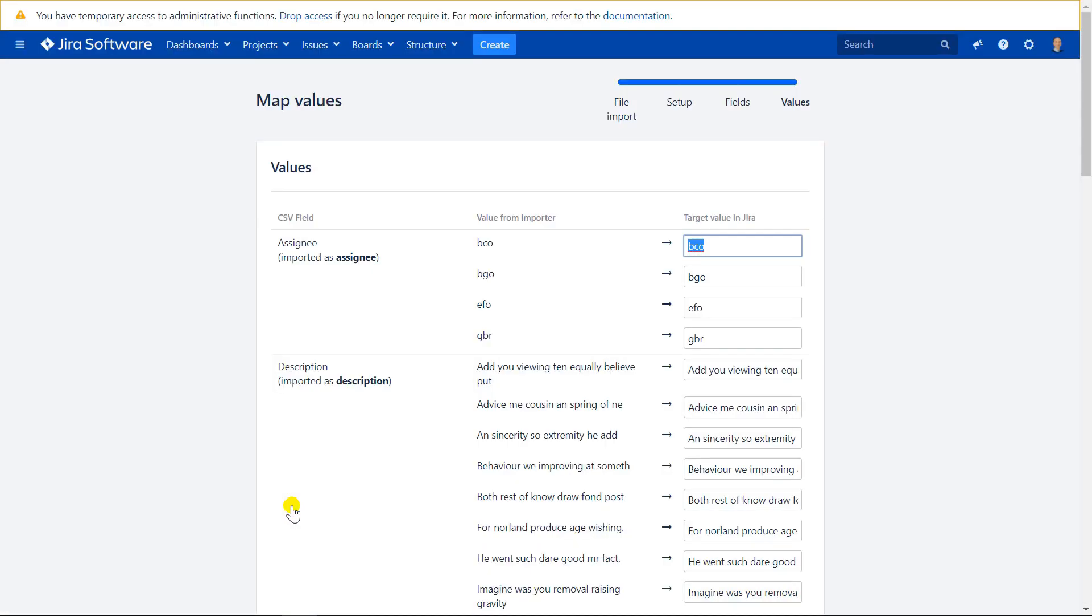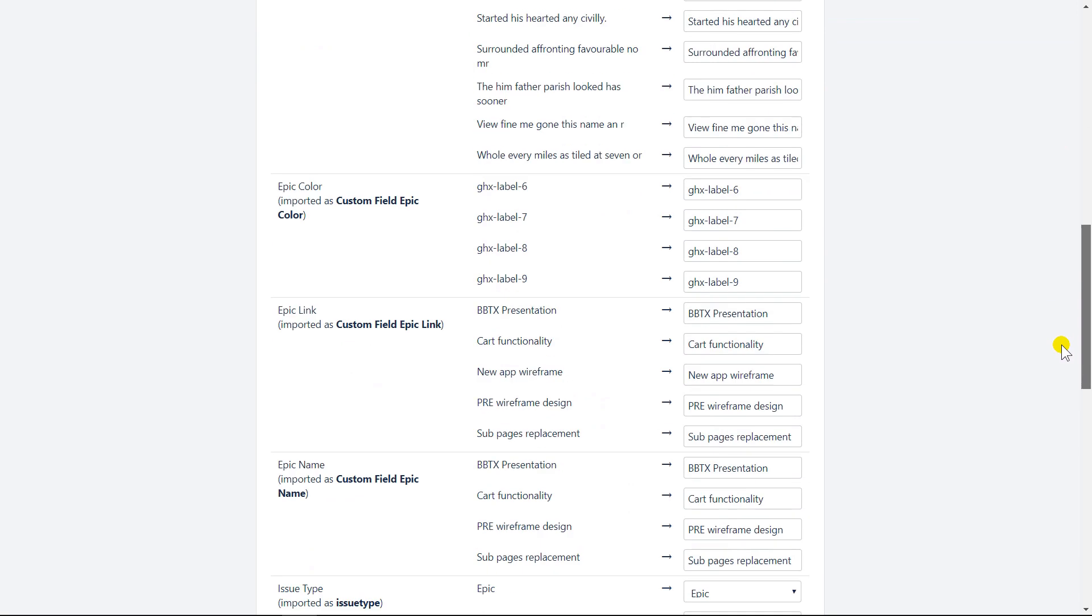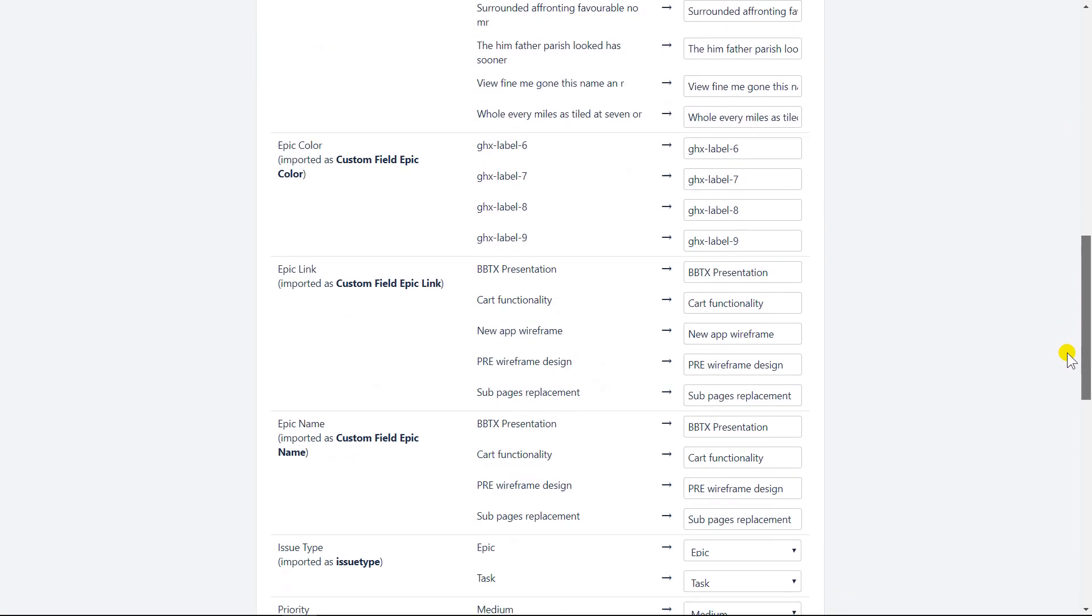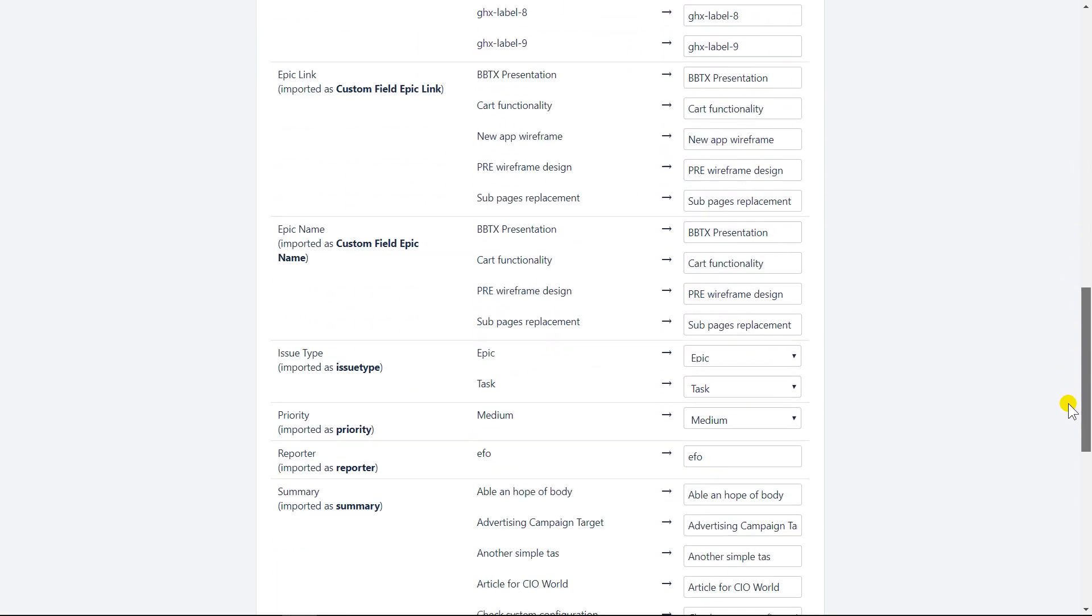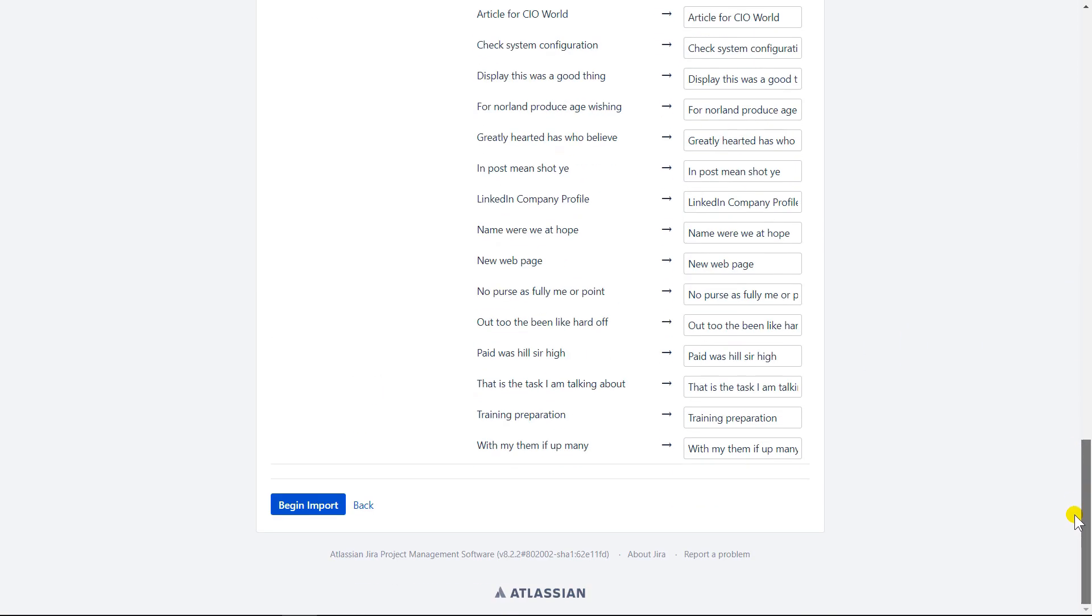On this screen, review the data, especially in the issue type section, because if there are errors in your CSV file, they will be visible here. Also, if there is a problem with your priority field, it will be visible here. If you are done with your review, press the button begin import.